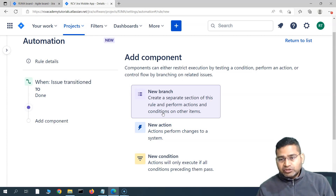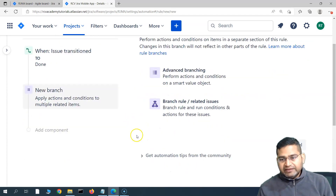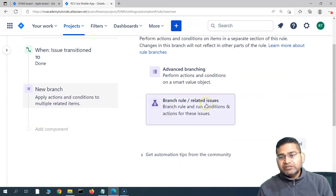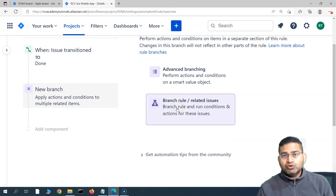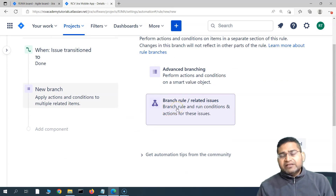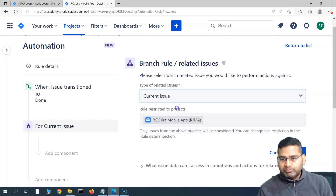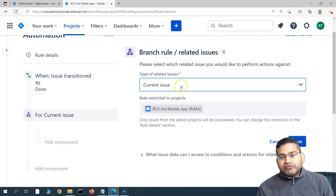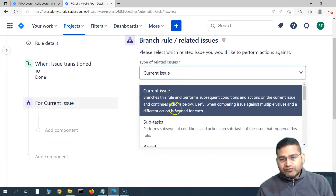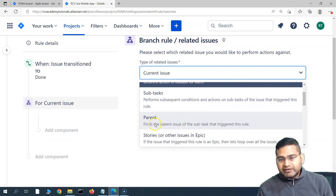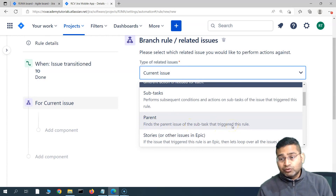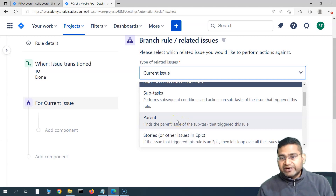I'll save the trigger. As we understood in the epic example — if all linked issues within the epic are closed, close the epic — similarly, we'll add a branch. We'll use a branch rule for 'related issues'. If you want to build a rule where there is a relation between issues, such as parent-child, this is what you need to use. Select 'branch rule / related issues' and from the drop-down, choose 'parent' as the type of related issue.